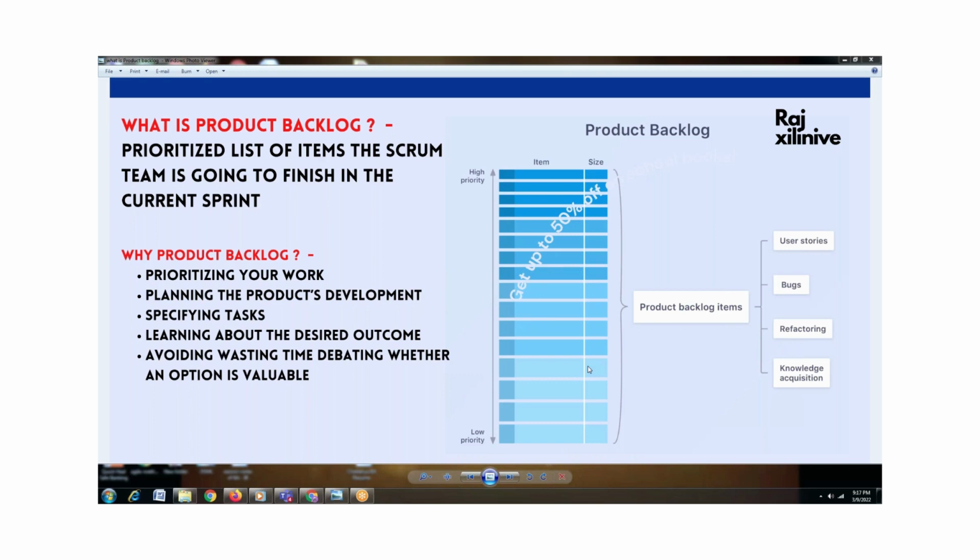This is how generally the structure will be maintained. We put the same user story on the next sprint, right? So you are planning that user story for the next sprint, not the present one. That user story will again be kept under the product backlog. So out of 10, if you see 4 are completed, 6 are balanced. Now one more is added. How many do we have? 7. Again, a product backlog refinement happens.